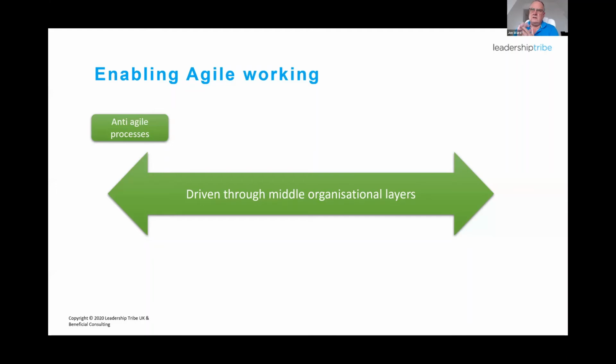What we have to do is look at, what are the anti-agile processes? There are things like personal incentive plans rather than team incentive plans. There are things like review and approval processes. There are things like toolkits and so on. Let's get onto those. But you can find the funding and the finances drive anti-agile practices. You have to get an estimate. If you get the finance team saying we've got to have an estimate for this, and it's got to be a detailed estimate, you need to get them to adjust to having a budget, and the budget is going to be worked on, rather than getting a detailed list of requirements. It's going to be at the big picture.